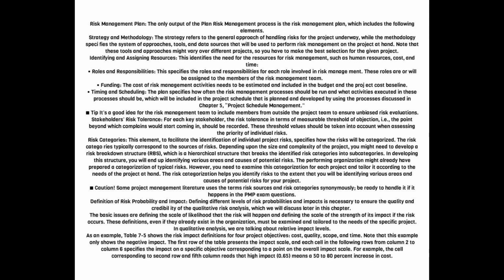Funding. The cost of risk management activities needs to be estimated and included in the budget and the project cost baseline. Timing and scheduling. The plan specifies how often the risk management processes should be run and what activities executed in these processes should be, which will be included in the project schedule that is planned and developed by using the processes discussed in Chapter 5, Project Schedule Management.